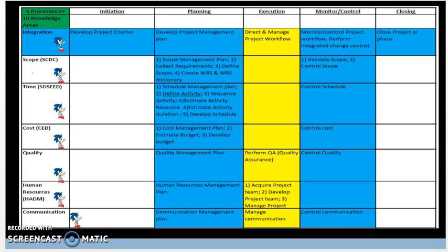Once the scope is finally agreed upon by both sides and signed off by all relevant stakeholders, this is the point of no return for major changes. If change requests occur after this, then the issues are going to rise, and this can contribute to risks such as schedule delays, overstepping the budget, overworking the project team's resources, and not meeting the voice of the customer requirements, resulting in customer dissatisfaction.